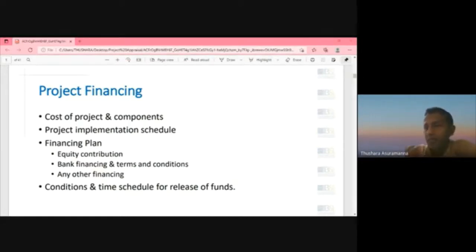You start with a clean sheet of paper, and only in future the building could come up. Only in future the building becomes a hotel. Only in future will you market to clients and get the cash flows and repay. So in order to achieve that level, you have to follow each milestone against the budget or against the agreed timeline up until completion of the project, marketing of the project, and even the pilot run of about 5 to 6 months, the initial period.